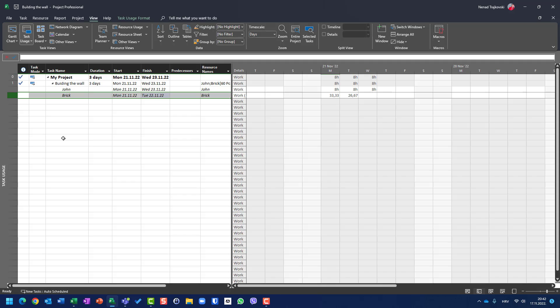Now, when I enter 60 bricks actual and zero remaining, keep in mind that Microsoft Project had planned 33.33 bricks per day. So Microsoft Project takes the 60 bricks and distributes them as follows: 33.33 were spent on Monday, and the remaining 26.67 were spent on Tuesday.